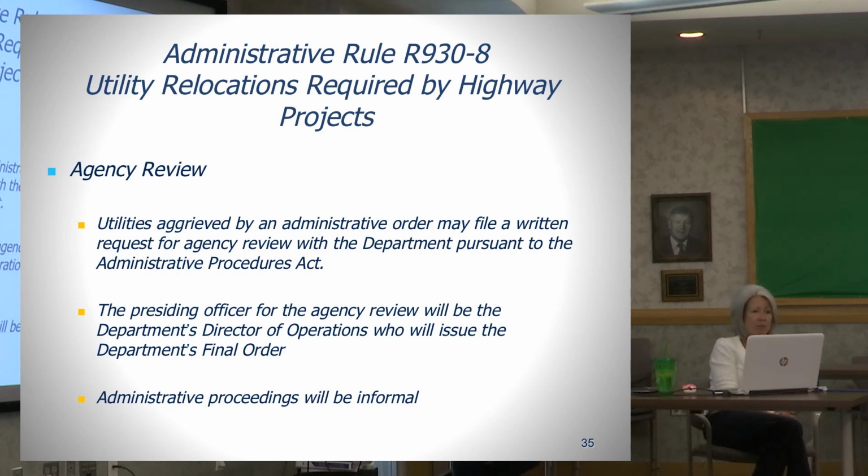there are requirements for contractors when they anticipate a potential delay to notify the resident engineers to start accumulating cost records on the costs.